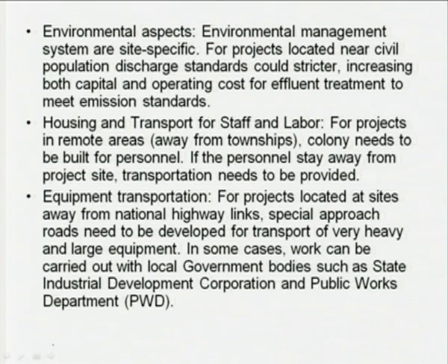Okay. Then the environmental aspects. Okay. The environmental management systems are site specific. If the project owner decides to go for ISO 14000 or ISO 9000, the capital as well as operating expenditure could go up compared to when only local discharge standards are followed.